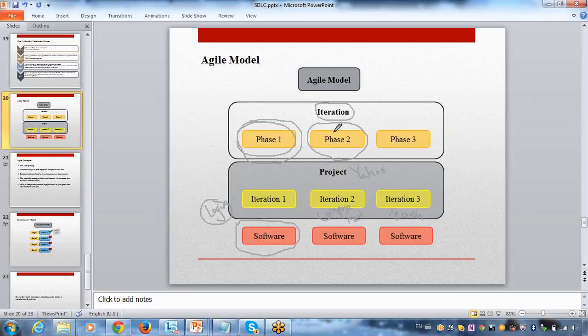Again, we will complete all the requirements, and we will show it to the customer. Now what will your client do? Client will say that yes, looks right, I need a few more changes. Let's go with the few more changes. Otherwise, if he is good, then I'm done with the first iteration. Then I will go to the second iteration, and the flow continues. This is called your iterative development in your Agile process.